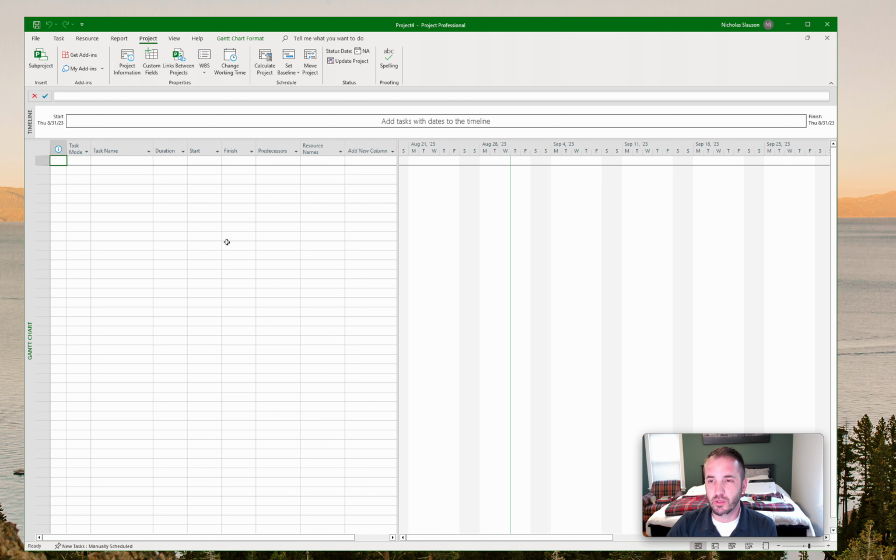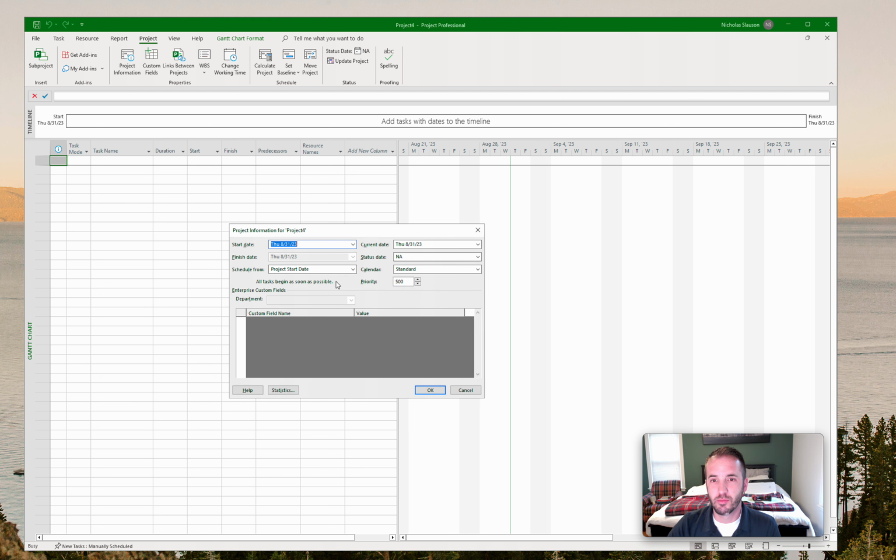There are a couple of things you want to set up right away once you open a new project. The first is the project information. Up here at the top you have your File, Task, Resources. You want to go to Project Information. Here you want to establish the project start date. It'll default to the current day. I'm recording this video on August 31st, so it automatically went to August 31st. But say our project happened on the 1st, you can pick that.